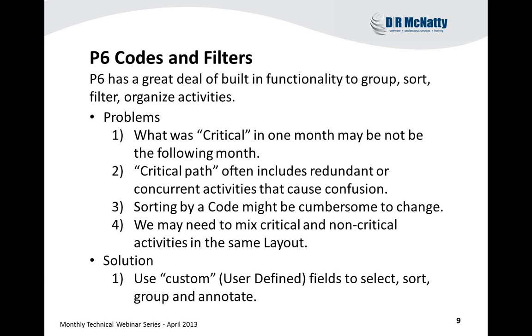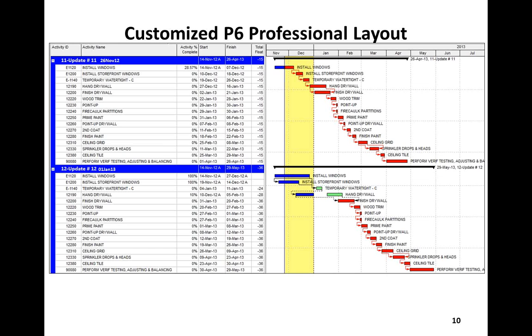Sorting by codes, we've all done that for a long time, but that can sometimes be cumbersome to make changes, so I use a little bit different approach. And as I said before, we may need to mix critical and non-critical activities in the same layout, so that requires a different approach, primarily using the user-defined fields or custom fields for select, sorting, grouping, and annotating capabilities. So here's an example of a customized layout.